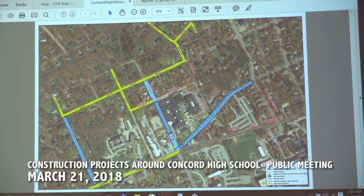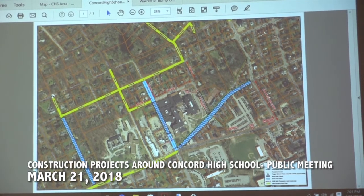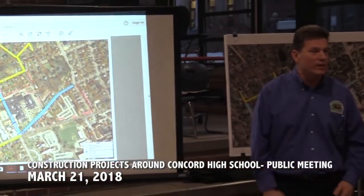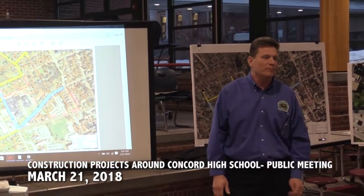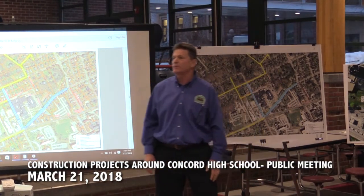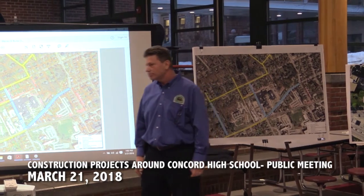Okay? Yes, sir. And you mentioned something about dropping the drains. That's going to be done too at the same time, yeah. You mean, lower it? Everything was on a sheet of paper, dropping. Yeah, in order to reclaim the road, you come through, you take out the grates and the frames that you can see, lower them down, so then they come through and grind it. Once they grind it, then we raise those back up to grade. Yep, those will be put back up to grade. Okay?